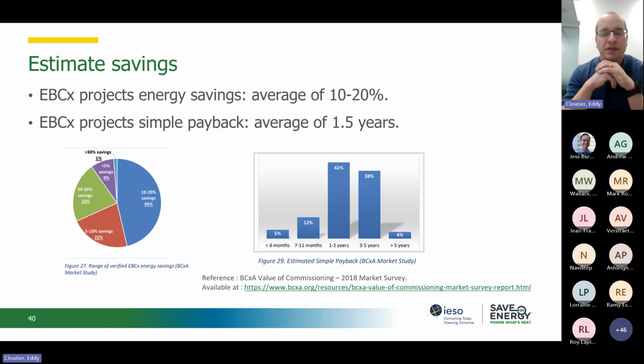For those of you who attended the first webinar, I think it was last October 2023, EBCx in a nutshell, we talked about the orders of magnitude saving that are typically discovered during a recommissioning project. As a reminder, statistics show that energy saving of 10 to 20% are relatively common for a simple return on investment of an average of 1.5 years.